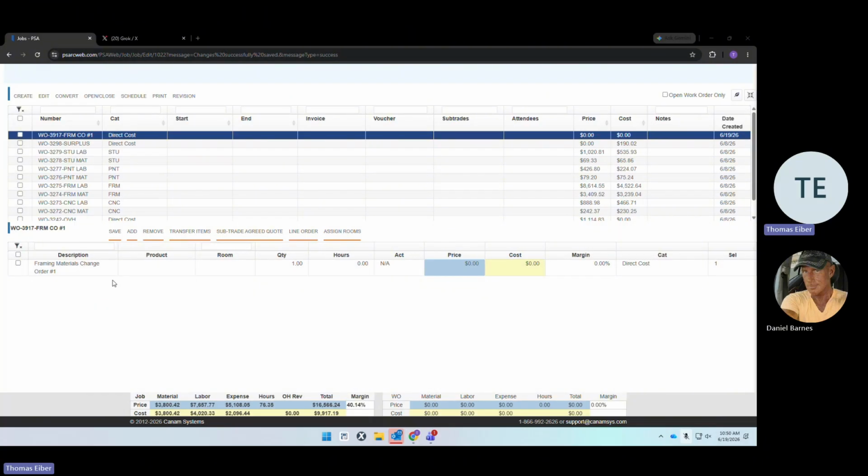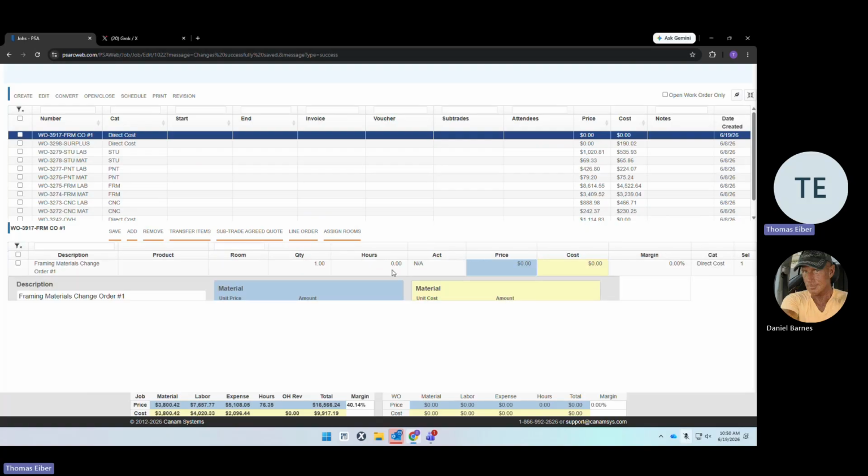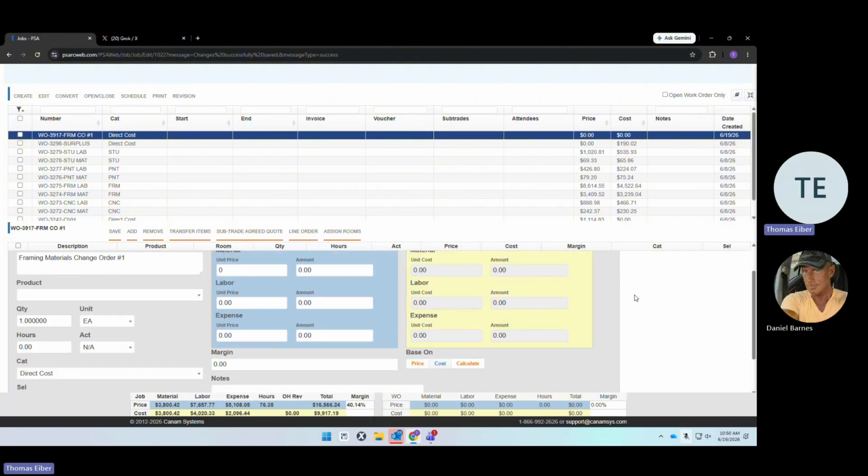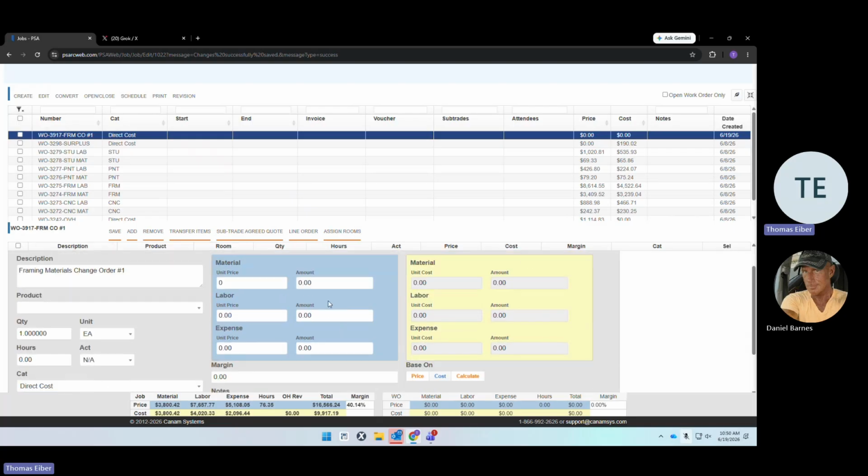Okay, so if I want to assign resources to this work order, I have to find those resources somewhere to transfer them, right? Because if I came in here and I tried editing this, editing the blue is not something we do as a PM, and it's going to change the contract total, which is absolutely not allowed. Do not attempt to change the blue numbers.